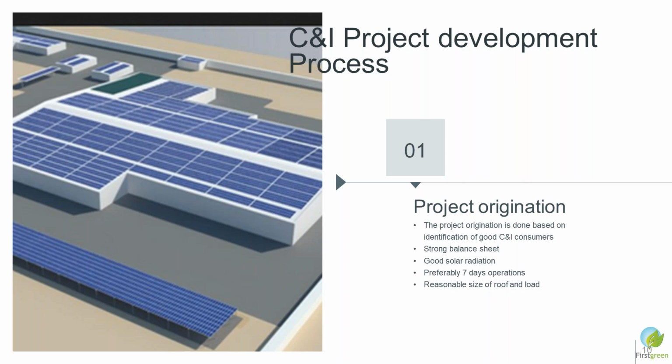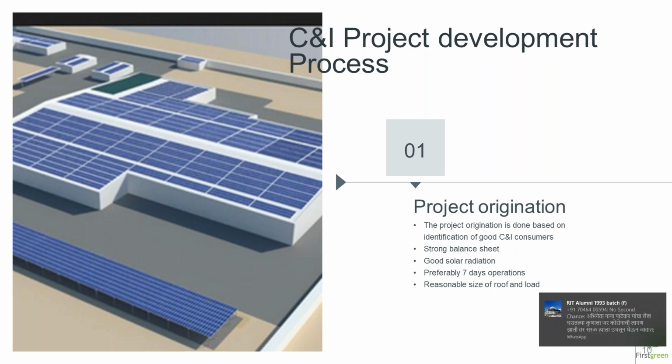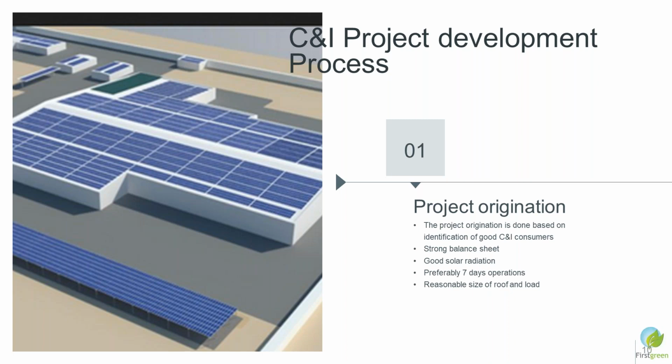The biggest issue is that the PPAs are dictated by the financing companies or banks who are providing debt or equity in the project, and they require a very strong balance sheet. So the company should be profitable, and they should have remained in profit for the last 3 years. Those kinds of checks and balances they do before funding these projects. Of course, we as a developer put in our equity as 30%, and the balance is funded by debt that is available in the Indian market through various sources.